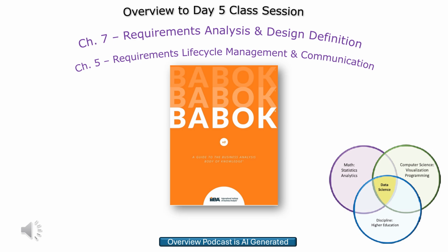So we're juggling. The chapter outlines three elements to help you with this process: basis for prioritization, challenges of prioritization, and continual prioritization. Let's talk about basis for prioritization first. This is all about the criteria you're going to use to rank those requirements. You might consider benefit, penalty, costs, risk, dependencies, time sensitivities, stability, regulatory compliance. So no one right answer. It depends on the project. Exactly. No one size fits all, but the key is to have a consistent framework for making those decisions.